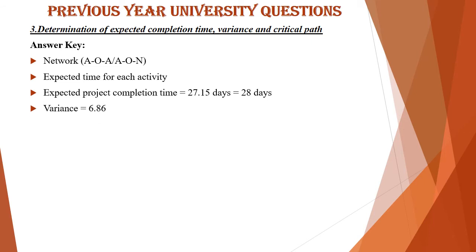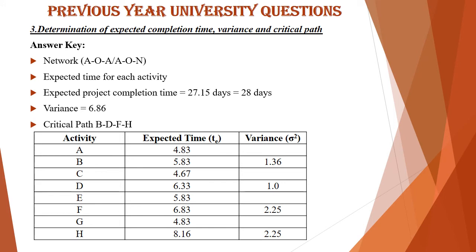Next, you have to estimate the variance. For calculating variance, the equation is: (TP − TO)² / 36. Here the variance value obtained is 6.86 and the critical path is identified as BDFH. This is presented as a table showing each activity with its expected time and variance. For every individual activity you estimate the expected time and list it in table format; the sum of the final column gives the total variance of 6.86.